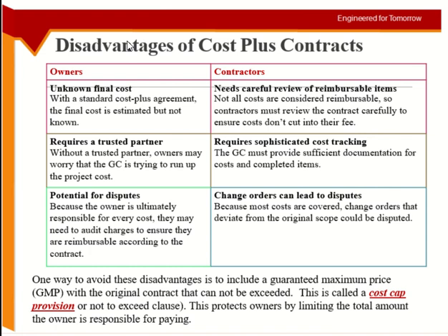The disadvantages are you don't know the final cost. The client does not know the final cost. The same problem that we had with the unit cost method. The problem for the contractor is for the indirect cost, for the overheads. So you are telling me material cost this much, labor cost this much, equipment this much, plus 2000 BD.